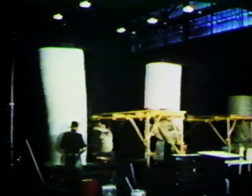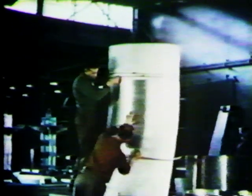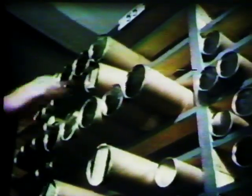Production tooling was started with the building of these master models. They are the basic forming tools for contour accuracy of skinned sections. Building a first aircraft using complete production tooling eliminates delay when quantity production is required. This new approach to aircraft production has proved most successful and is being widely adopted in the production of other high-performance aircraft. As the thousands of drawings of tested, proven design were released for manufacture, the tempo of production quickened.